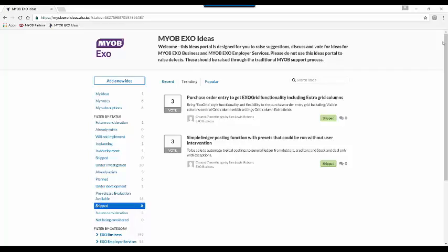Anybody that works in projecting type work, quite often what they invoice out to the client is quite different to what time and materials actually get spent on the job. You'll have an agreement with the client for progress billing, and it will allow you to track the stages of the job, and report at the end of the job on what it's actually cost you to complete the job.